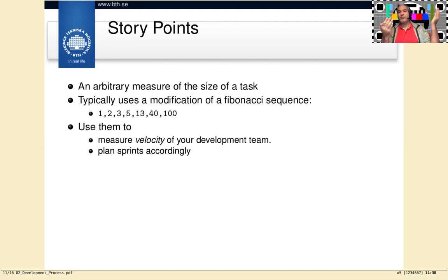Next user story, is it bigger than my first user story? No, it's smaller. How much smaller? Well, it's slightly smaller. Okay, 3. So this gives me a reference point, and then every new user story that I assign points to, I can do that relative to my first one.